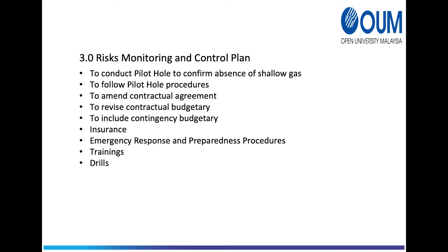Trainings were also provided to ensure competent personnel and understanding of the project risk. One of the mandatory trainings that is required by client is permit to work. Other trainings such as personnel basic offshore requirement training, for example, basic offshore survival and emergency training, are required before personnel can join the campaign.